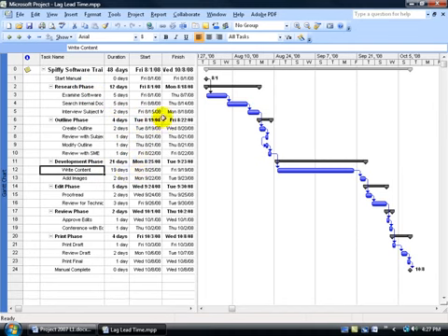So even if I throw more resources at this, more workers to help complete this earlier, it doesn't matter. As far as the project end date goes, this is stuck on September the 1st, which will affect all successors. Now, successors, if we're lucky, can probably finish earlier and help close up the project date or bring it in a little bit sooner, but you can see how limiting that can be. But nonetheless, if you feel it's important that you need to do it, then go ahead and I'll show you how to do it.